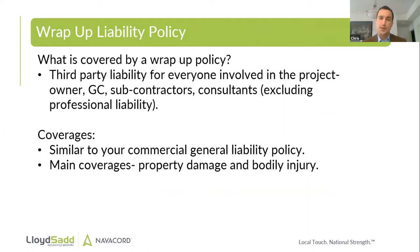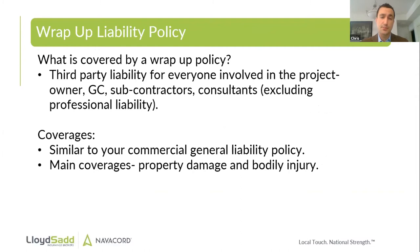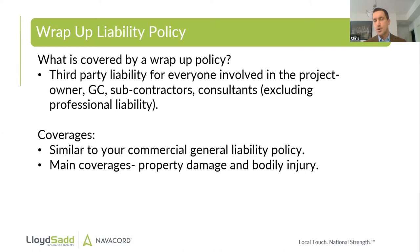What is a wrap-up liability policy? The best way to think of it is that it's very similar to the commercial general liability policy that you'll have in place, except it's purchased for that specific project and covers everybody on that project — the owner, GC, subcontractors, even consultants, excluding professional liability. The main coverages are very similar to your CGL, the main ones obviously being property damage and bodily injury. If something happens causing damage to a neighboring building, vehicle, or person, that's when this coverage would kick in, rather than damage to the project itself, which is covered under your COC.